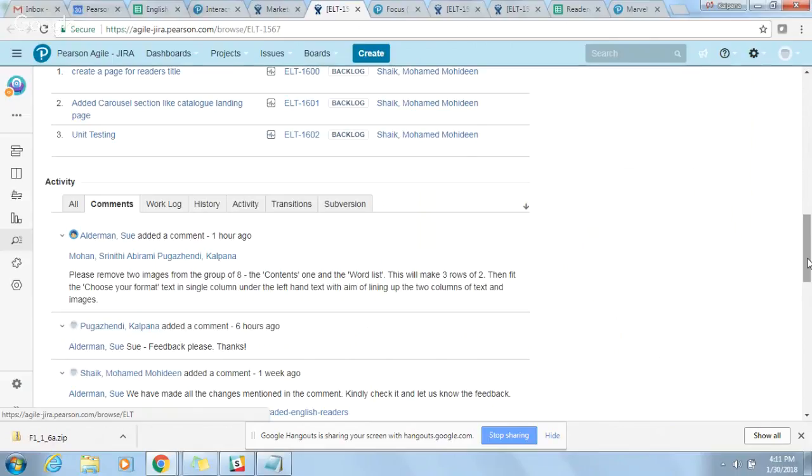Okay, so actually, what's the latest you could receive changes? We have planned the staging tomorrow, Sue. So would it be okay to take it in the next sprint? That's my backup option, but it's not the favored option because Marvel are launching in February. So we would have to wait another 2 weeks for the page to go live.